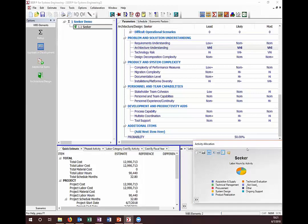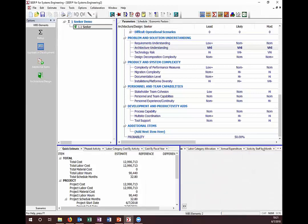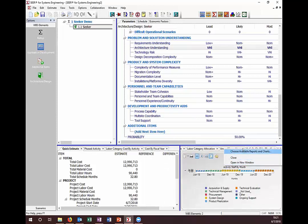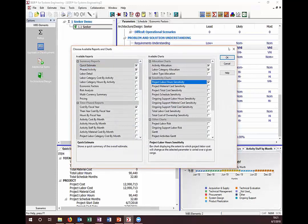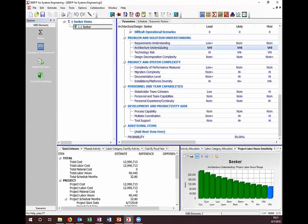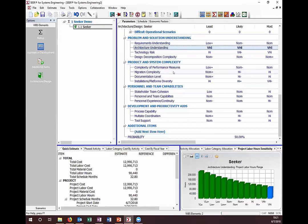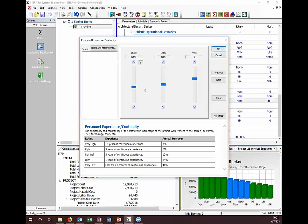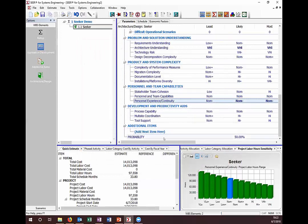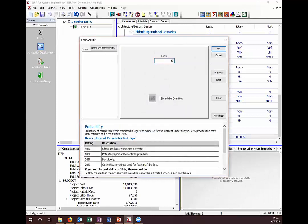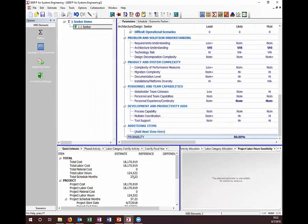If you want to see how sensitive the estimate is to any one parameter, you can choose the sensitivity report. We can see that architecture understanding has a fairly high impact when you change it to very high. We also know that we have lost some people — turnover of two out of twenty is about ten percent, so I'm going to set this to nominal low, which is going to drive up our estimate a little. We know we have a not-to-exceed, so we'll set the point estimate at eighty percent. And that's it — now we have our estimate given what we know, built in just a few minutes.